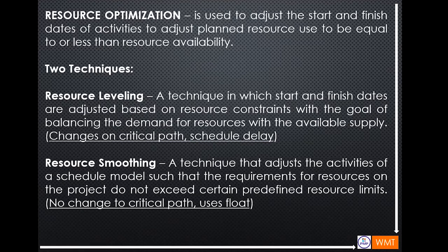So normally here in Singapore, if you use resource leveling, your company will get a penalty. That's what we call the liquidated damages, or LD. I have yet to experience this because normally if we cannot meet the contractual schedule, we will apply for an EOT. EOT means extension of time, but this is subject to approval. Previously, extension of time could easily get approved, but nowadays it is quite difficult. But with a valid reason like the pandemic, no need for discussion.